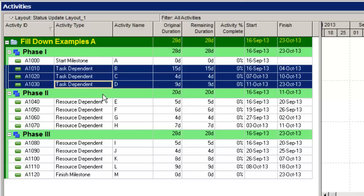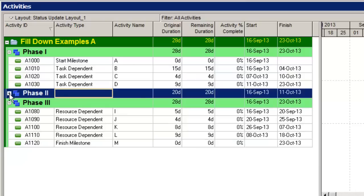Now let's say that I want to set phase three activities to task dependent, but I want to leave phase two activities as resource dependent. What I want the tool to do is skip over these. And the easiest way to do that is to collapse phase two. Once I collapse that grouping band, I can select task dependent.